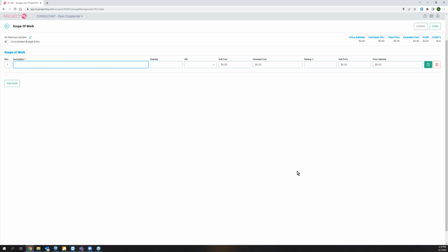And then there's other contractors that might put more detail into a line item. You can put in, for example, a description here. Maybe I do underground utilities. So I'm installing 200 more feet of sewer pipe or something. So maybe my change order description is install additional 6-inch sewer pipe, quantities 200, unit of measures foot, unit price is $20 a foot or whatever it costs. Because when I show that change order to the owner or the customer, that's what they need to see. They need to see how many more feet of trench we have to dig, how many more feet of pipe we're putting in, what the labor per foot of pipe is. And there's a printable form that prints all that detail.